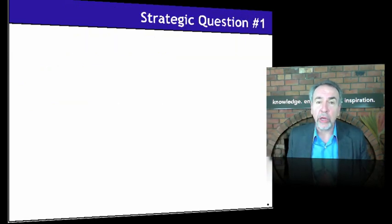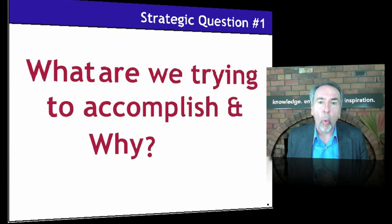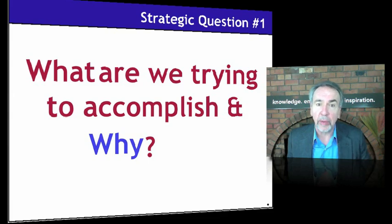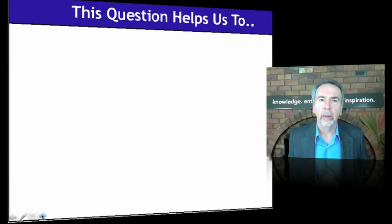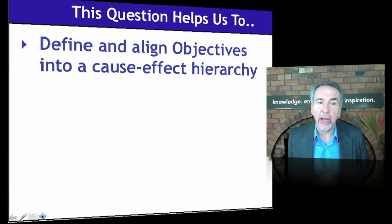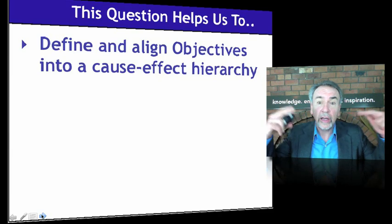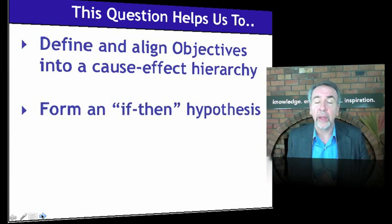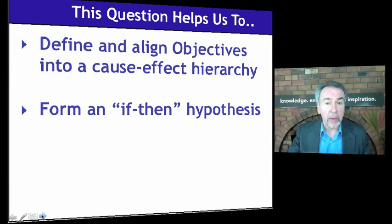So here's how to make your goals smarter. Let's begin by asking the question: what are we trying to accomplish and why? Putting the emphasis on the why, and also defining some of the whats, you will end up with a series of short phrases — I call these objectives — which we can then arrange into a logical order. This question helps us to define and align objectives into what I call a cause-effect hierarchy, a logical hierarchy, to form an if-then hypothesis which relates objectives to each other.